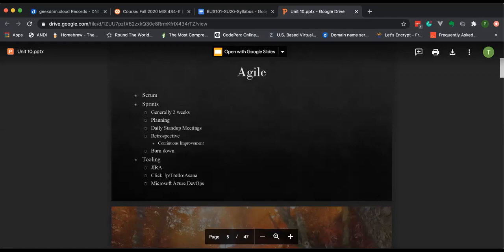They get together and they do a Scrum of Scrums, where they share what everybody on their Scrum team is working on. Then depending on how large teams are, there might be another layer above, another Scrum of Scrums of those leads. And then eventually that high-level work product progress gets reported up to the executives in charge of the engineering organization. Okay. Now, within that sprint, generally I said 2 weeks, but that can vary.